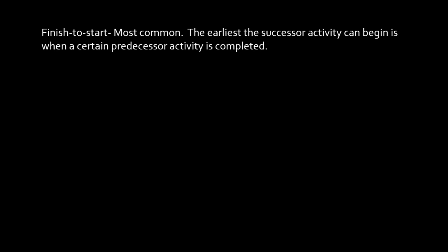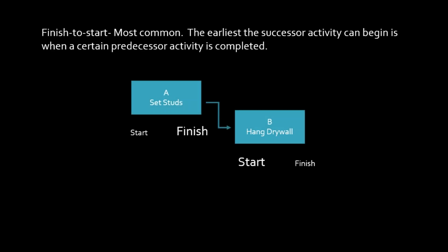The first dependency is finish to start. It's the most common. This is the waterfall one, where I set studs before I can hang the drywall. If you notice, the dependency is this: finish to start.